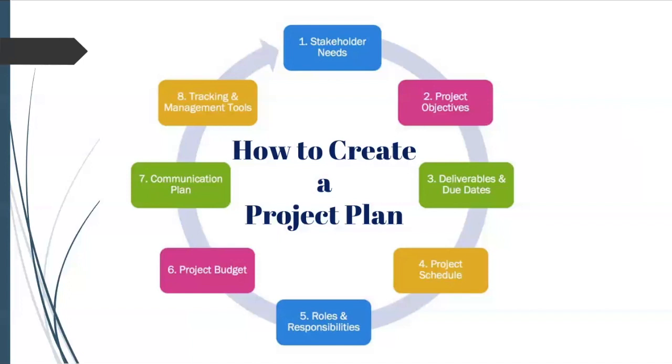And let's say the project is running for 2 months. In 1 month, approximately you have 20 working days. In 2 months you have 40 working days. 40 working days times 3,000 per day, that would be the exact budget. And on top of it, there are certain unknown risks, delays, plus buffers, so you'll put a little bit of buffer on top.